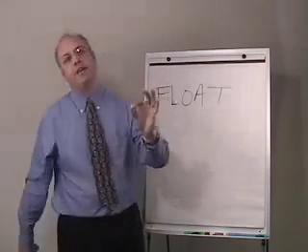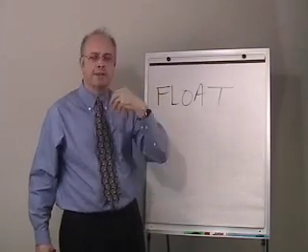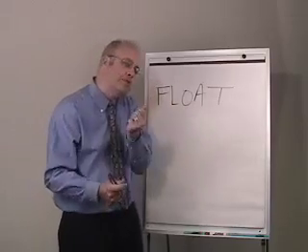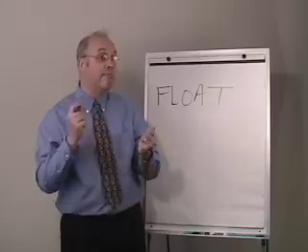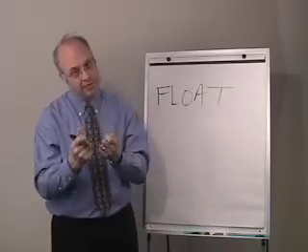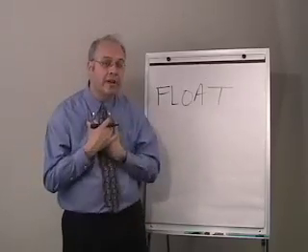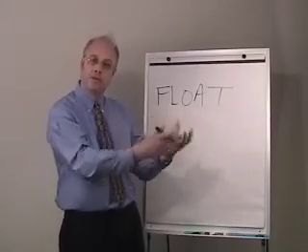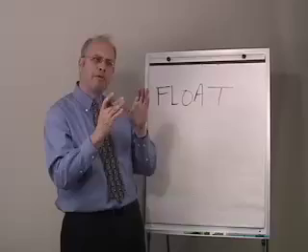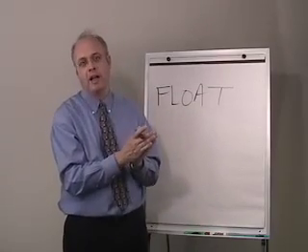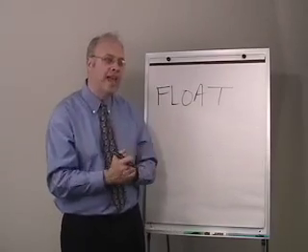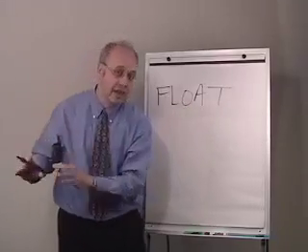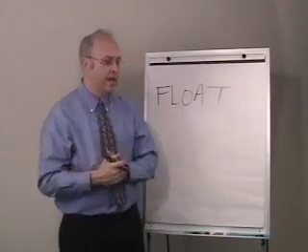The question might become, really, is float a useful number? And I think if you think about it as a difference between when I can start and must start, it clearly is something useful. For example, as an owner, I might be able to use float in order to make a revision to the project, and that revision might fall on a path of work that has float, and as a consequence, even though I change the design, I don't necessarily have to change the project completion date.